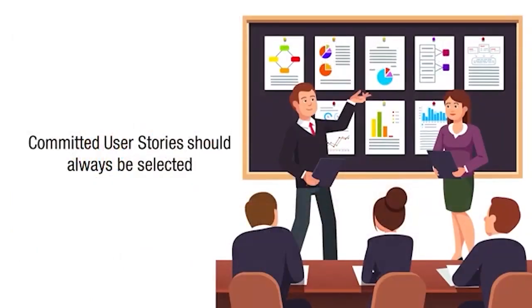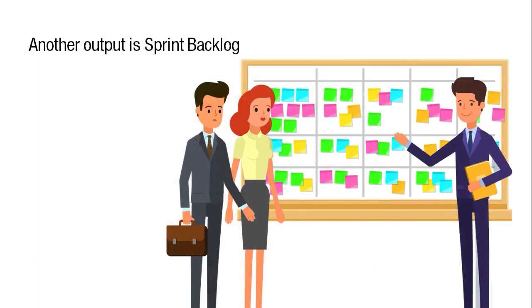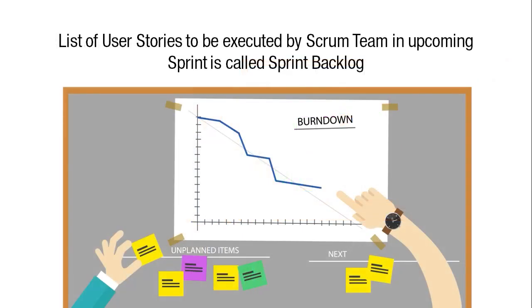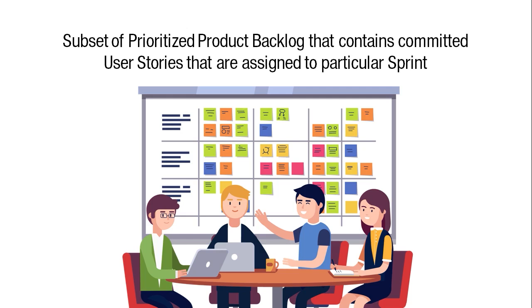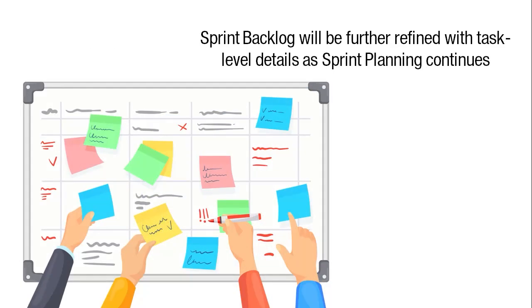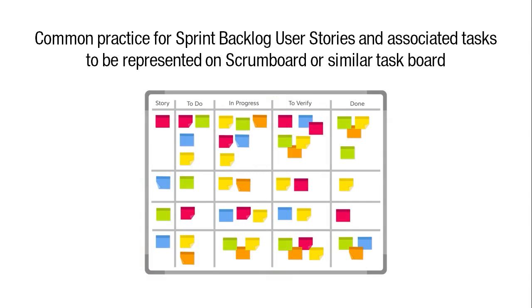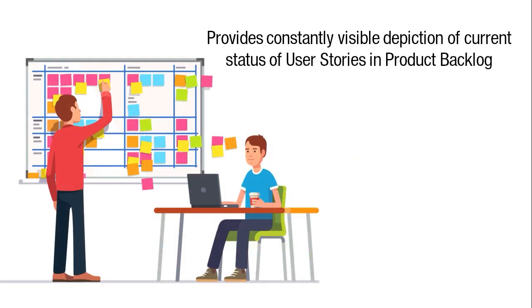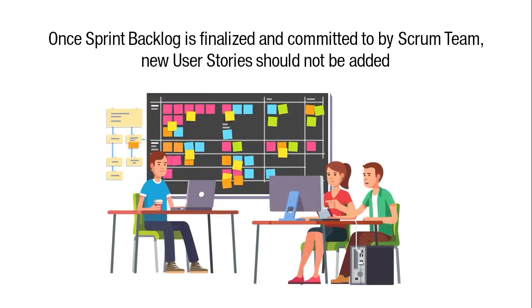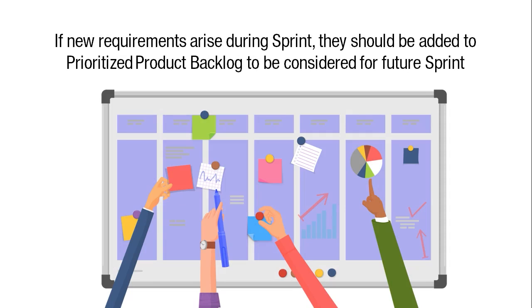Committed user stories should be selected per the priorities defined by the product owner. Another output is the Sprint Backlog — the list of user stories to be executed in the upcoming sprint, and a subset of the prioritized product backlog. The sprint backlog is commonly represented on a scrum board. Once finalized and committed to, new user stories should not be added. If new requirements arise during a sprint, they should be added to the prioritized product backlog for a future sprint.